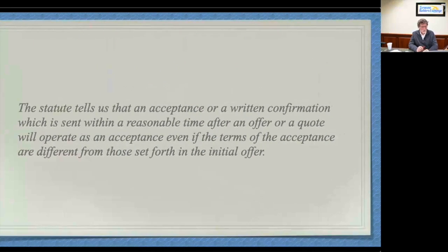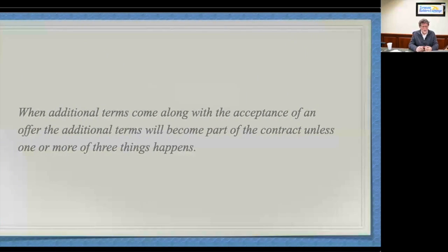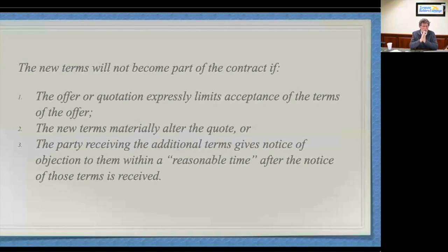But the code tells us that when additional terms come along with the acceptance of an offer, the additional terms will become part of the deal. So you send a quote, I send you a PO with my terms and conditions. My stuff becomes the deal, unless one of three things happens. The quote is expressly limiting acceptance to the terms of the quotation, which has got to be done very clearly, very obviously. In my world, big, dark, bold print.